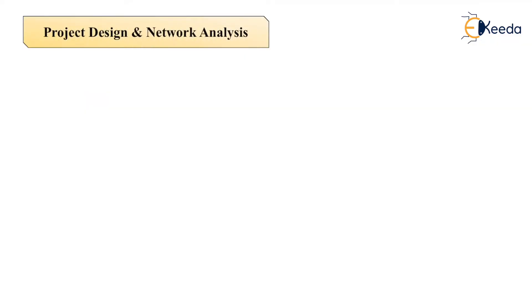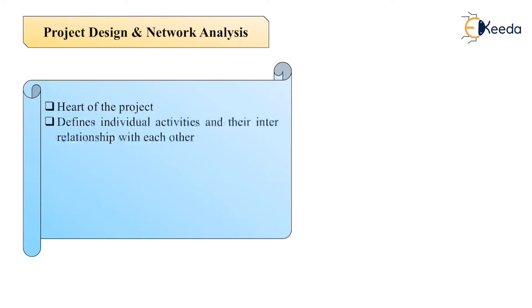Next step is project design and network analysis. Now this forms the heart of the project. It defines the individual activities and their interrelationship with each other. For example, if you go for concrete, first we have to go for batching with the given proportions, then we have to go for mixing, then after mixing we have to go for transporting, placing, compacting, and then curing.